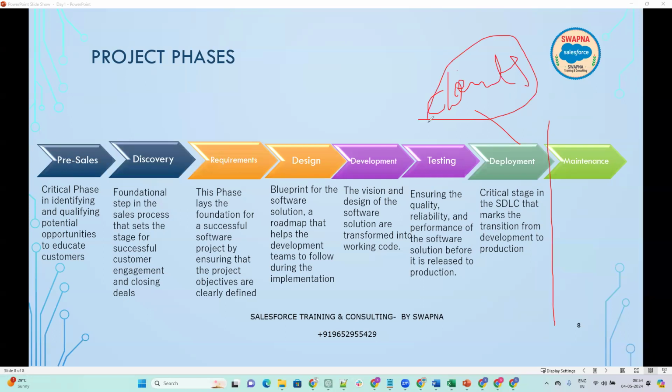Clients will test it and start working on this application. While working on this application, clients sometimes will see issues. So whenever the client is facing an issue, we need to give support to them, which is maintenance. After the deployment, after the production, we also have hypercare. Hypercare is nothing but a 2-week support we will give after deploying the changes to the production.